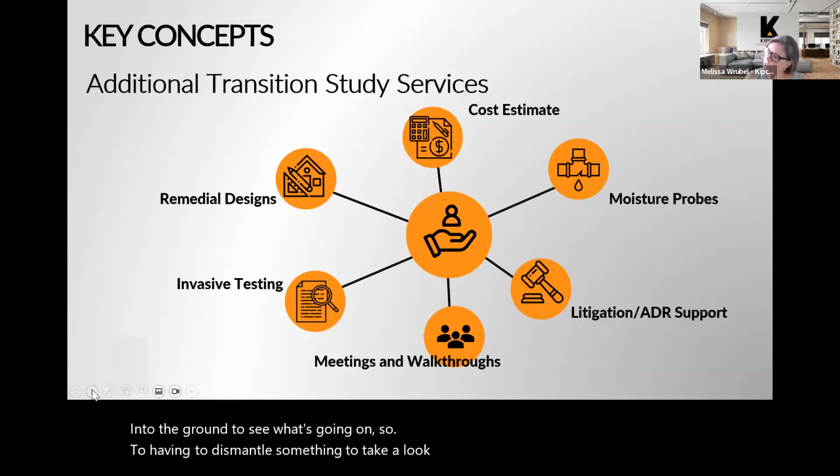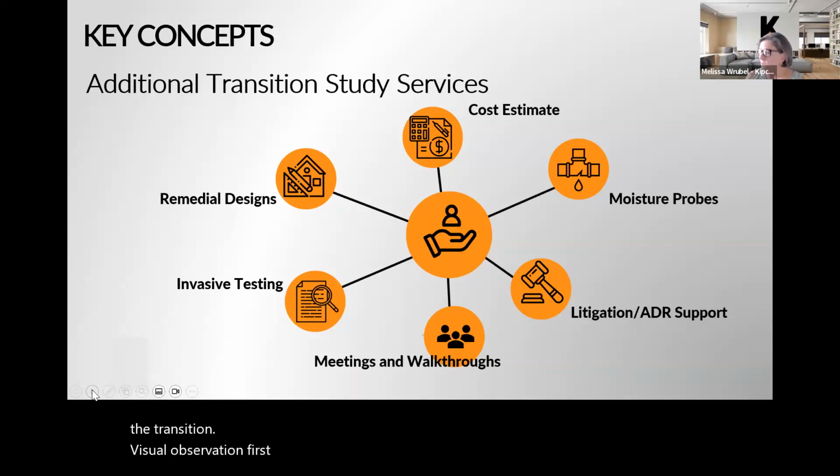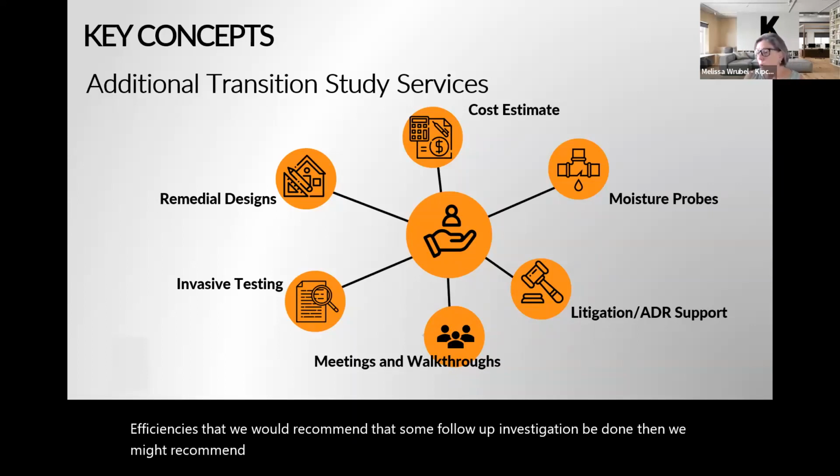So we don't do that initially as part of the transition study. We do a visual observation first, and then if we see some deficiencies that we would recommend that some follow-up investigation be done, then we might recommend some of these moisture probes or some invasive testing.